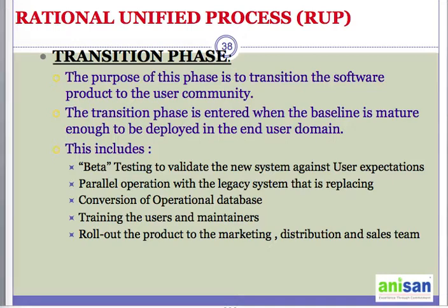After that there is regression testing. After integration there may be additional testing. Then the QA team is performing intensive testing, and towards the end you may see that UAT is performed and users have tested and provided their sign off. After that only we are ready for transition.